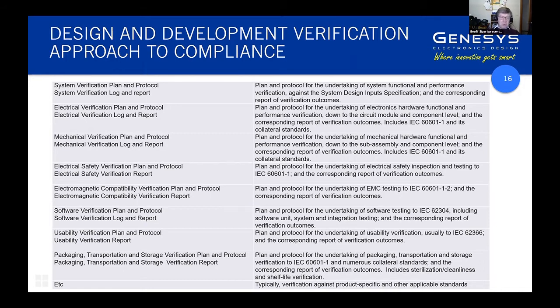And we have two steps of that. One step is to actually define all the tests, and then there are additional columns, generally in an Excel spreadsheet, for the capturing of the actual results. So you start off with that document defining the detailed tests, then you use the same document or an updated version of it to capture the test results. And I'll illustrate this for an example for electronics.